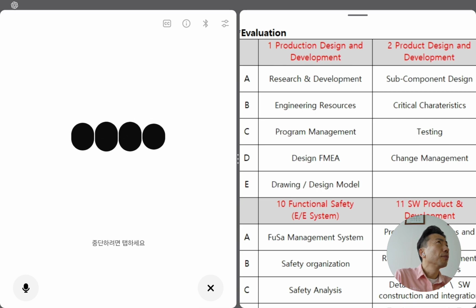5. Who is responsible for approving drawing changes, and how is that approval documented? Answer: The approval responsibility belongs to the engineering manager and the project manager. Approval is documented in our system with electronic signatures, date, and revision level. This ensures traceability and accountability.